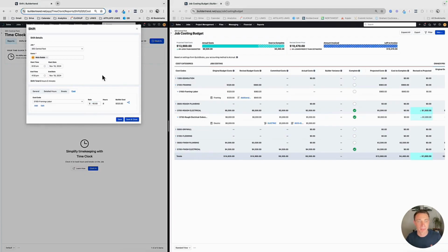And then this plus my 100% markup gives me the rate that the customer has agreed to pay. That way, if I give the employee a raise during the project, I don't have to change the rate to the customer. That looks bad, right? I can just kind of absorb it with the fact that I've rounded this rate up a little bit.